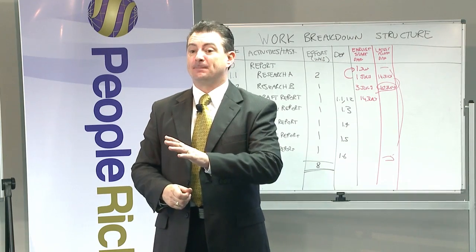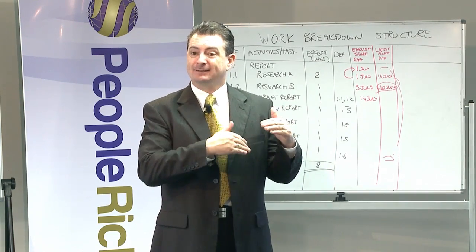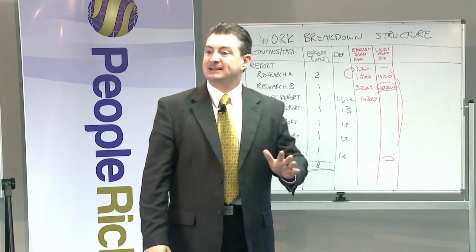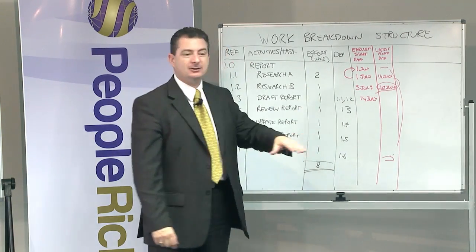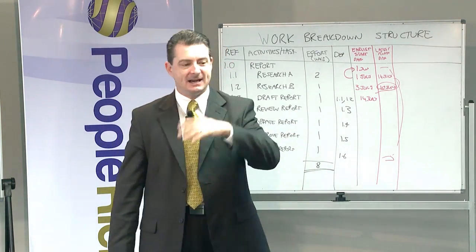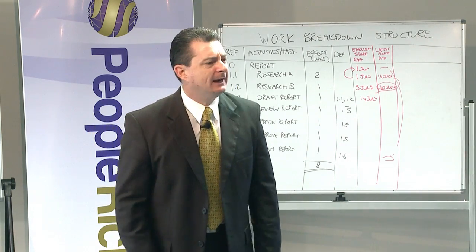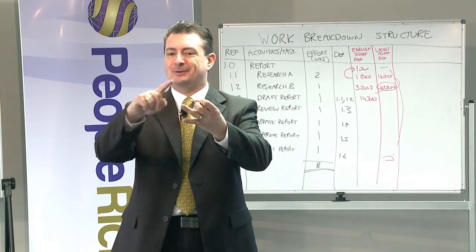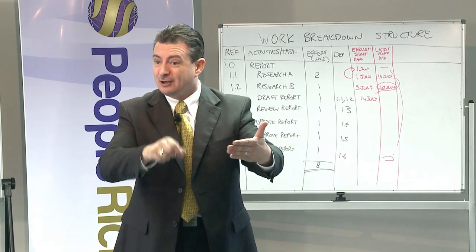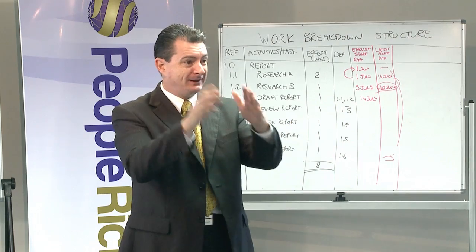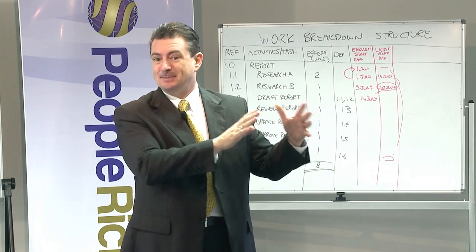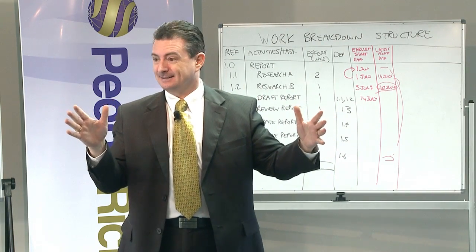But here's the thing. If you want to get this right, when they estimate something at a high level, I said, how long is that report going to take? And they might say 8 weeks. I could ask this question, how did you work that out? And they're going to say, well, we're going to have to do some research. That's when you write it down, because if you don't know the industry, all you have to do is write down what they're saying they will be doing as part of that guess.